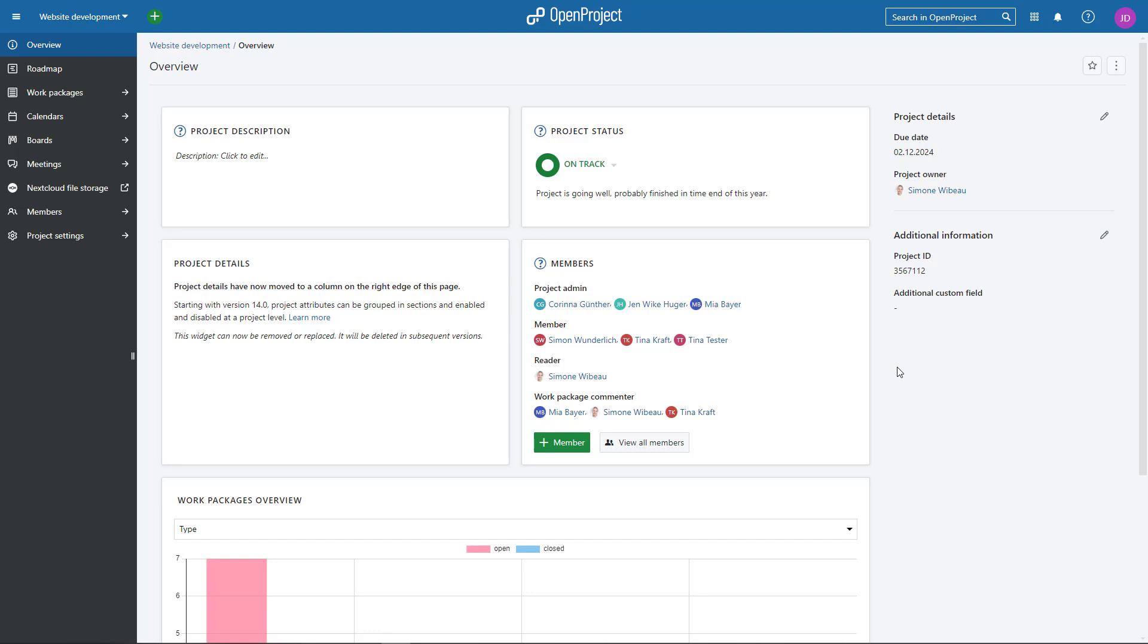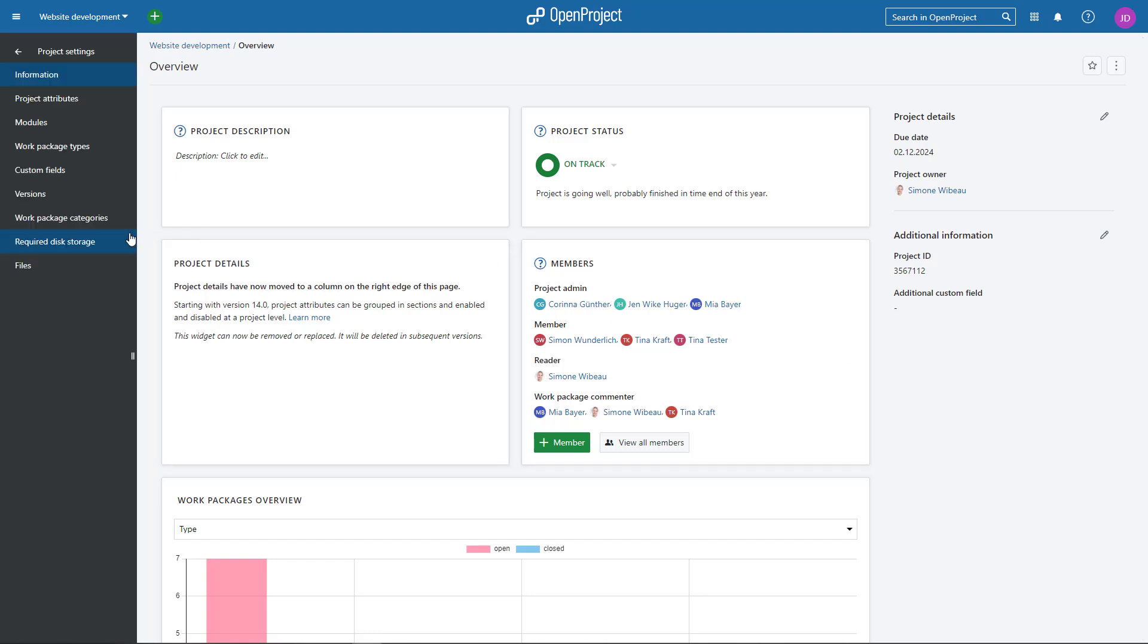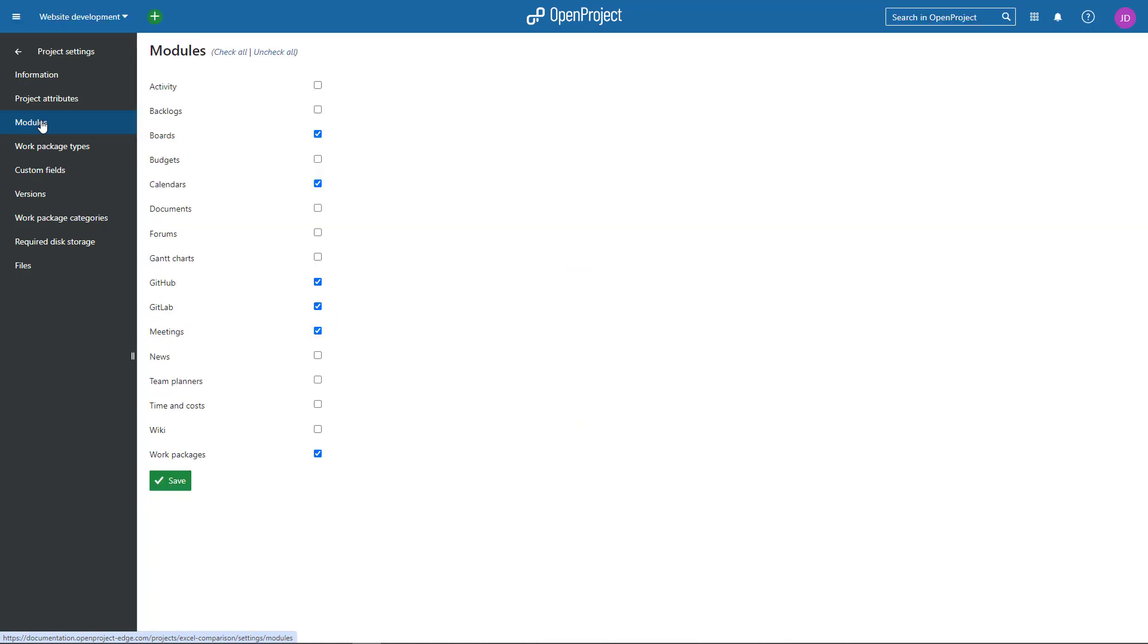To activate Gantt Charts for your project, go to Project Settings, Modules and check the box for Gantt Charts. Don't forget to save your changes.